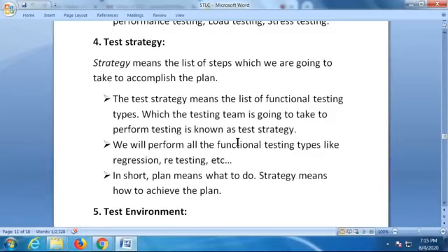Suppose you, the whole team, reported 20 defects. Before releasing to the customer, go and check whether the 20 defects have been fixed by the developers, and whether you retested and closed them or not. Yes, some chances are there; some defects can be postponed also because of some issues. So discuss with the manager, discuss with the leader before we close the project.